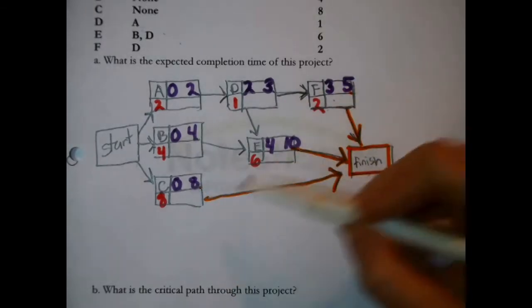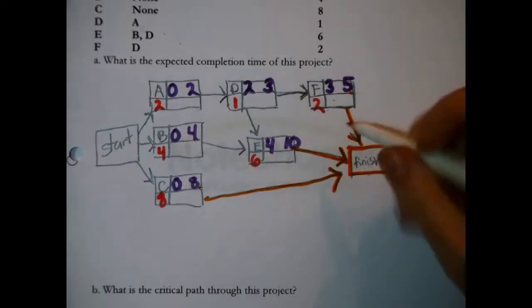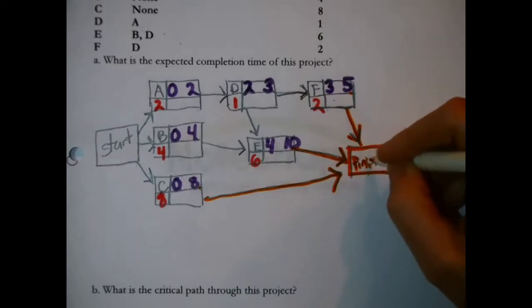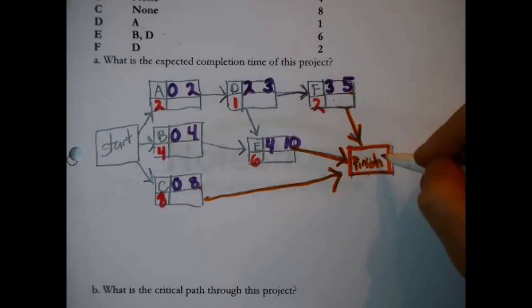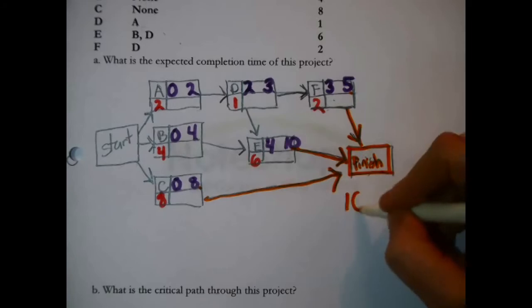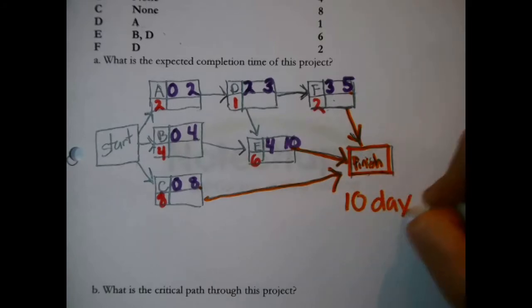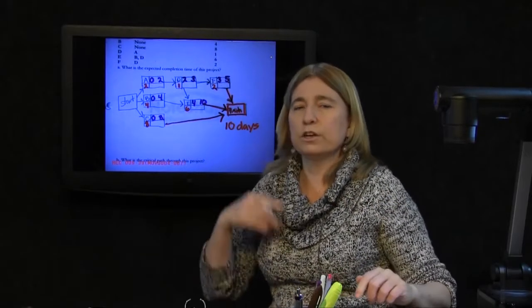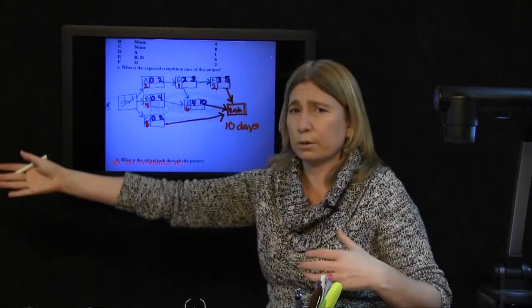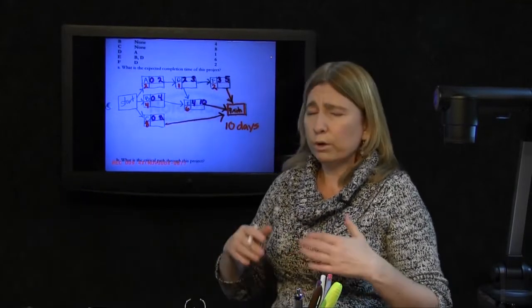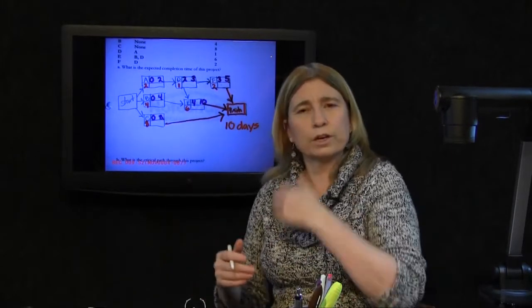They each are going to have to finish in order to declare this is the grand finish. We're done. Therefore, what is the earliest we would be making that announcement? Pick the largest. Because we'd be waiting on finishing up each of those 3 things. Them being connected to the end means that they will be finished towards the end. There's nothing else that comes after them. All right? And we would be waiting for them all to finish. So when the last one finishes, that's where we get the largest number.